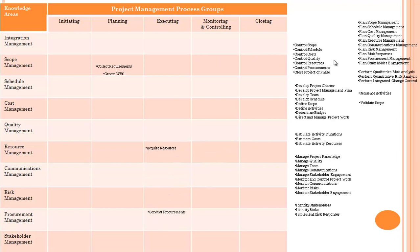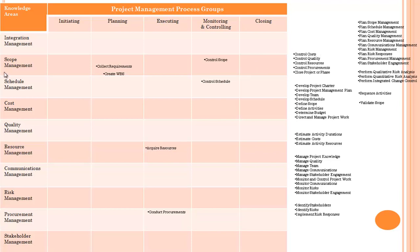Control scope — remember, all processes that start with control will go under monitoring and controlling process group. Control scope means it will go to process group monitoring and controlling and knowledge area scope. Same way: control schedule, control cost, control quality, control resources, and control procurement all go under monitoring and controlling.